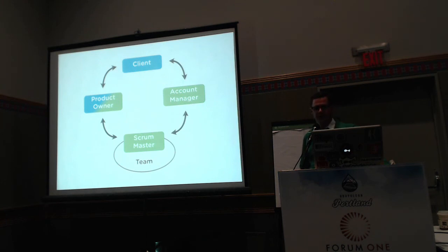It changes constantly. One rule we have is that nobody works on more than 2 projects. The task switching involved in hopping from one project to another is really difficult, and it's hard to get into flow on a project. Sometimes it can take a whole afternoon if you're switching from one project to the other. So we don't want that happening on 3 or 4 different projects. It's very inefficient. So nobody works on more than 2 projects.